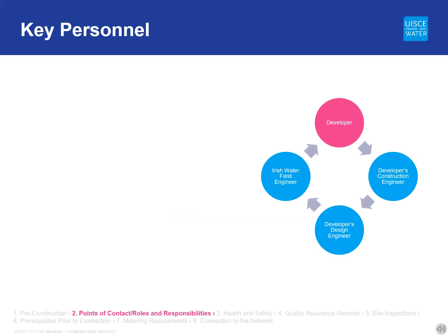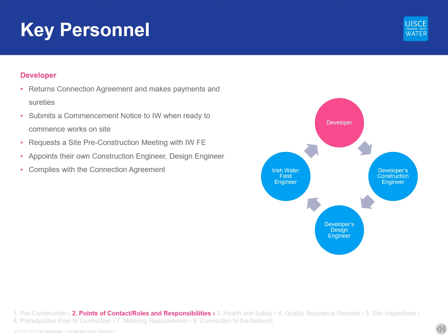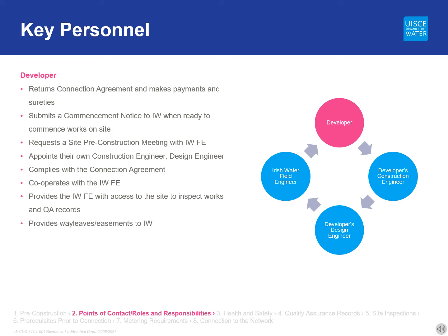The developer is the proposer of the works. They must ensure that the connection agreement is returned to Irish Water and that all relevant payments and sureties are paid in full. The developer must also submit the commencement notice to Irish Water when ready to commence works on site, request the pre-construction meeting with the field engineer, and appoint a construction engineer and a design engineer. They must ensure the works comply with requirements set out in the connection agreement, that site personnel cooperate with the field engineer, and that the field engineer has access to the site to inspect works and quality assurance records. The developer must also arrange for way leaves and easements, issue the final documents to Irish Water, and appoint a person to provide sign-off confirming that the development complies with the work set out in the connection agreement, including all testing and commissioning.